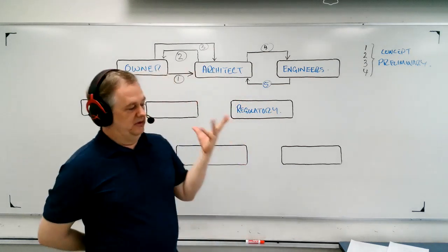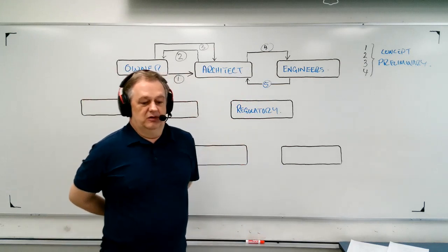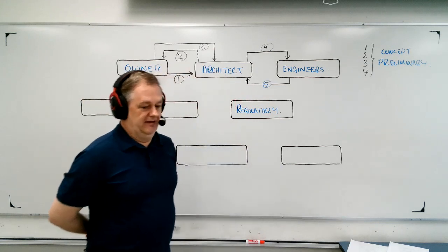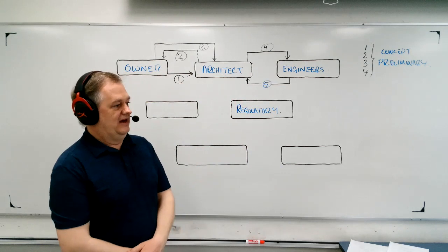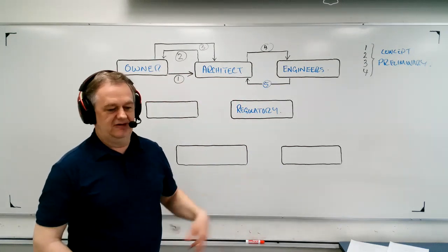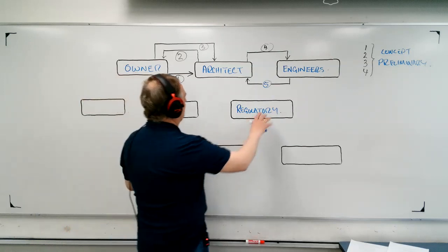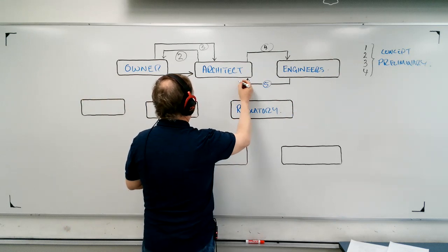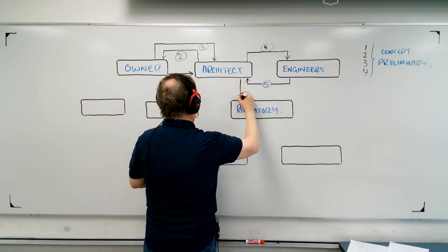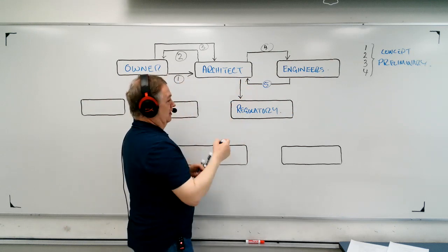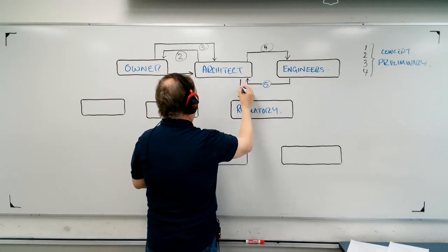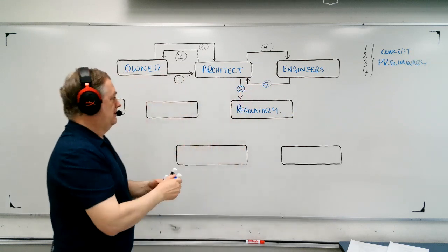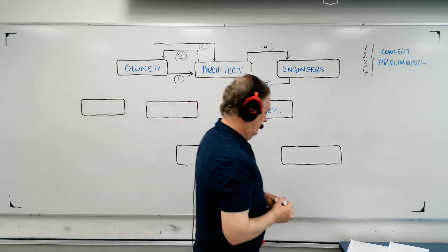If this building was here, you'd have to go to BC Hydro and say, look, we want to build this project, it's this size. And so they have people that actually go over the plans and say, okay, that building's going to take about this much power, and in that neighborhood, that means we're going to have to upgrade some line to supply power, and so on. So regulatory is the next step. And so the architect sends the plans to the correct bodies who are going to either give their thumbs up or give their thumbs down.